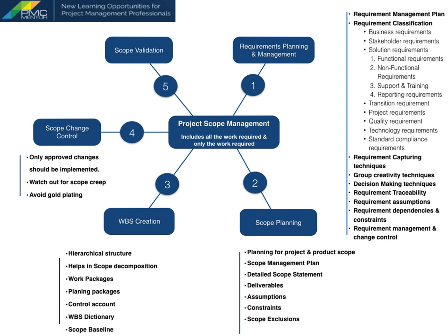Project manager should watch out for those changes that may get implemented without approval. Such changes are considered as scope creep. Another thing to watch out for is gold plating. It refers to extra features and functions not requested by customer, but project team tends to add those, in order to make the customer happy. This is a big no-no and should be avoided.